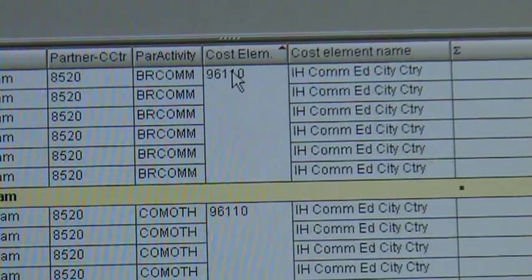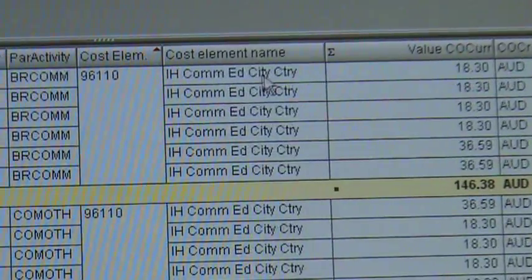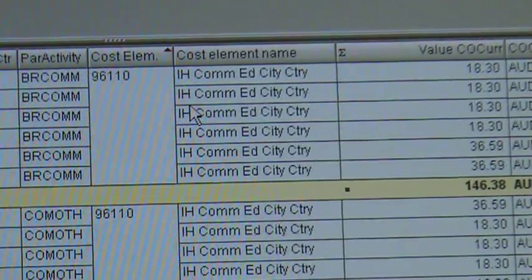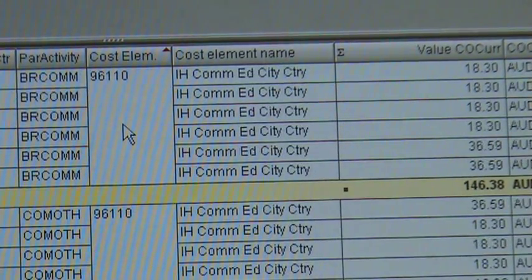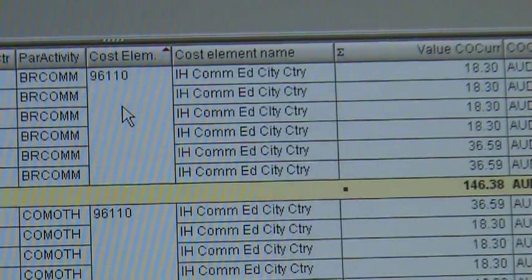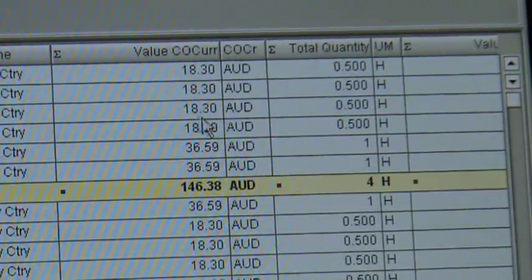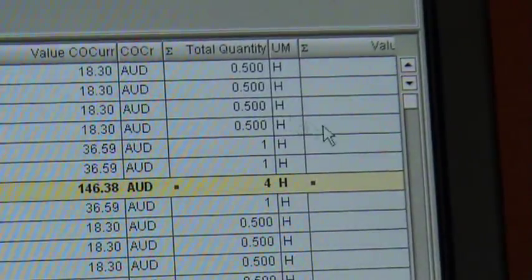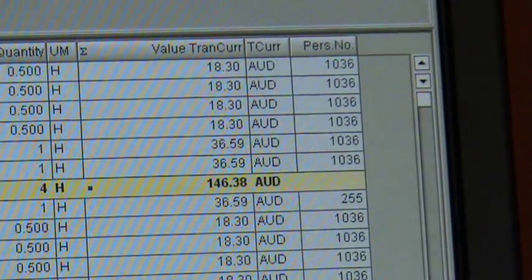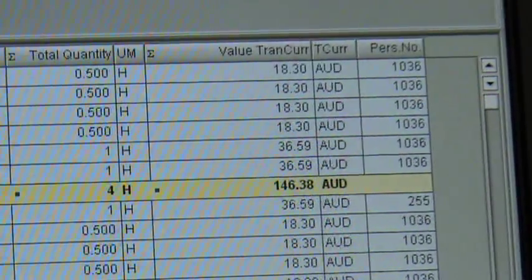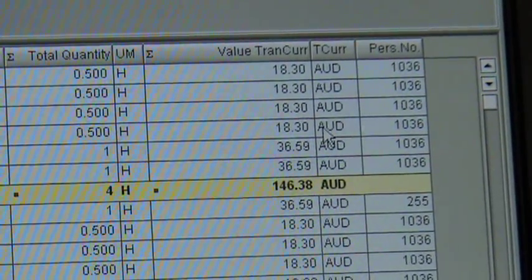Each cost element will be linked to a particular activity. In this case it's in-house commissioning editor, city, country. You will see in other cost reports that this is an important thing to know about — cost elements always repeat themselves. A cost element is like a bank account really, it just collects costs. Then you keep coming across value — this is in Australian dollars — and quantity, which is the hours. If you scroll across you'll see a second value column. If this project was a US project, that second column will actually display the value in US dollars.